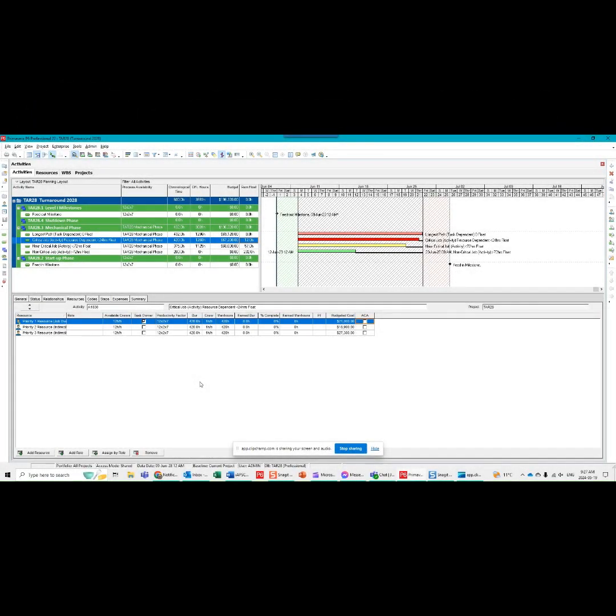Lesson on Primavera for shutdown, turnaround, and outage. I'm going to show you how it's possible in your Gantt chart to represent the longest path, critical jobs, near critical jobs, and non critical in the Gantt chart using the basic stoplight approach. Here you're going to see that I'm using a longest path with zero float for a system.